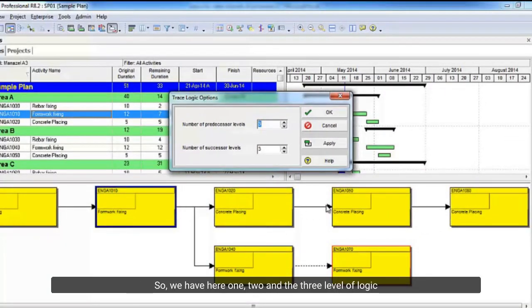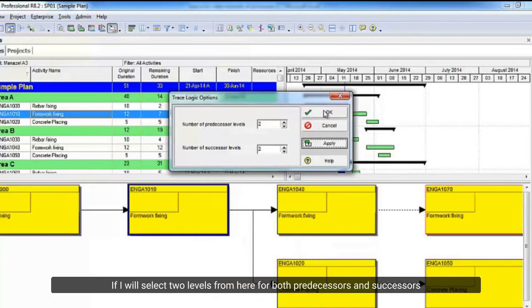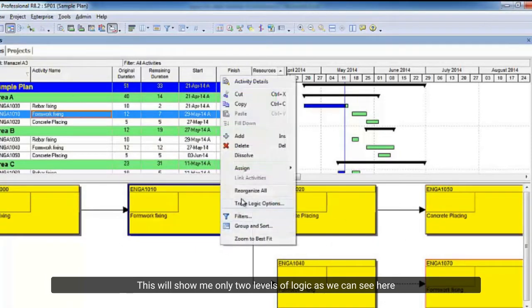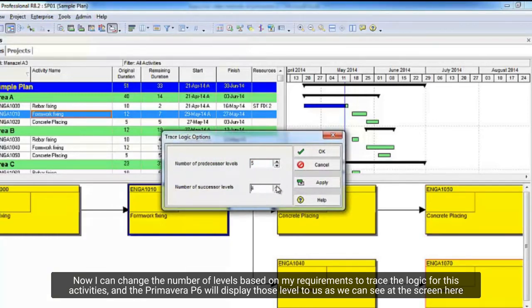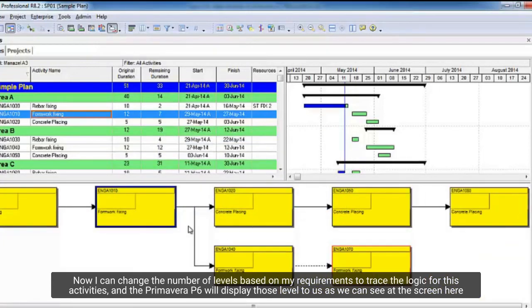So we have here one, two, and the three level of logic. If I select two levels from here for both predecessors and successors, this will show me only two levels of logic as we can see here. Now I can change the number of levels based on my requirements to trace the logic for these activities, and Primavera P6 will display those levels to us as we can see on the screen here.